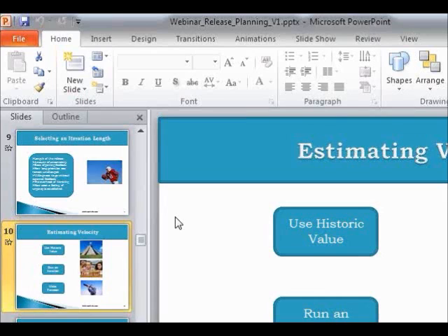Now, depending upon your business and the stage of your project, for example, if it's a first project, then you may have a minimum marketable feature as a first focus area for the release. But if the release is an incremental release, then you may have different goals. For example, by this release we want to make our product secure, or in this release we want to get into social media. We want to make our job site compliant with Facebook, Google+, Twitter, etc. So the release goal derives the functionality which is needed in that particular release.